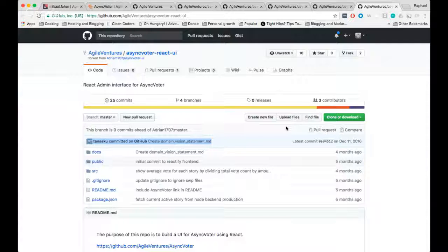You say it's going to take a week. Why do you think that? And then after that discussion, somebody else might say, no, it's only going to take 1 day, and you talk about that with them. Then after the discussion, you re-vote, and hopefully you reach a consensus, or the project manager at least can reach a consensus. And it provides an estimate.